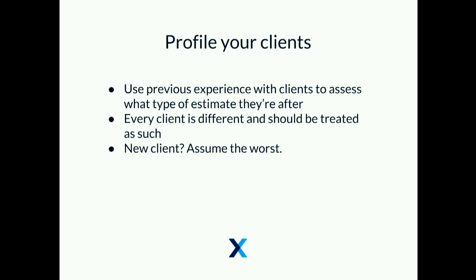I would also advise you to profile your clients. All of my clients are very different, and the way I handle estimations with them is very different. Some prefer to spend a little time up front and then iterate and provide feedback throughout. Others are big government agencies where it's really challenging to get budget — they want to know the absolute worst case scenario, get that approved, and know they have room to move. If you have a new client, just assume the absolute worst and you can't really go wrong.